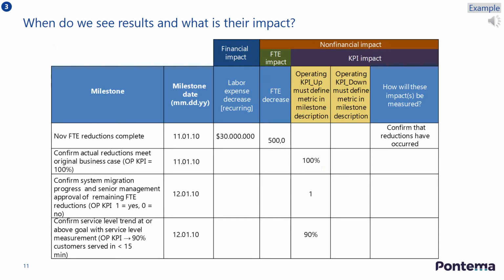The second page of an initiative plan should be more quantitative in nature and highlight the key milestones and impacts to measure success and risk. An example is shown in the slide. Milestones are major deliverables, outcomes or activities to be completed by a defined deadline, and impacts can be financials or KPIs. You would normally see 20 to 30 critical milestones and impacts in a plan, each tied to the project's most important value drivers and risks.